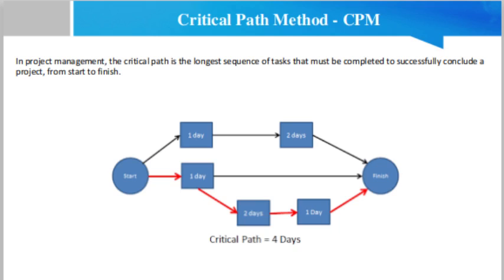The critical path method includes identifying each and every task to complete the project and the dependencies between them, estimating the duration of the project tasks, calculating the critical path based on the task durations and dependencies to identify the critical activities, focusing on planning, scheduling and controlling critical activities, setting project milestones and deliverables, and setting stakeholder expectations related to deadlines. After making these considerations, you gain insight into which activities must be prioritized.